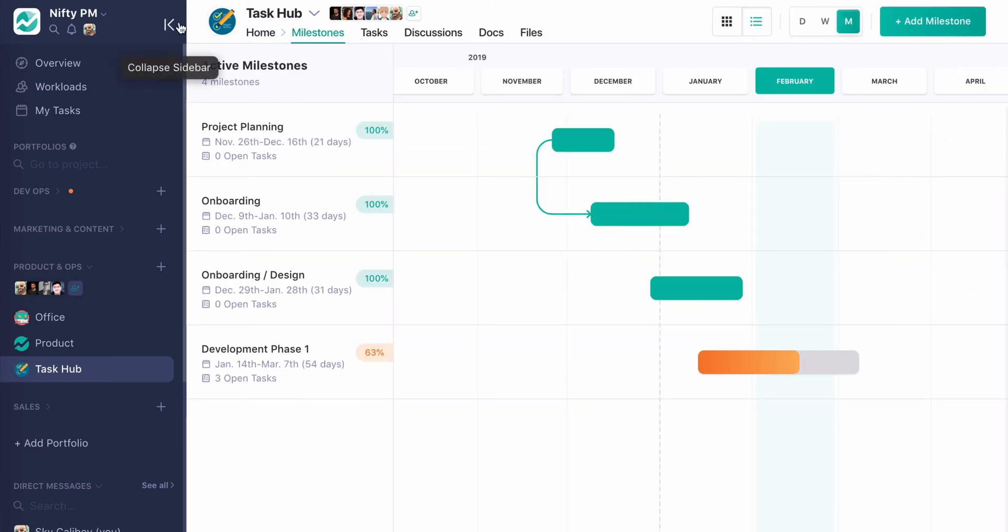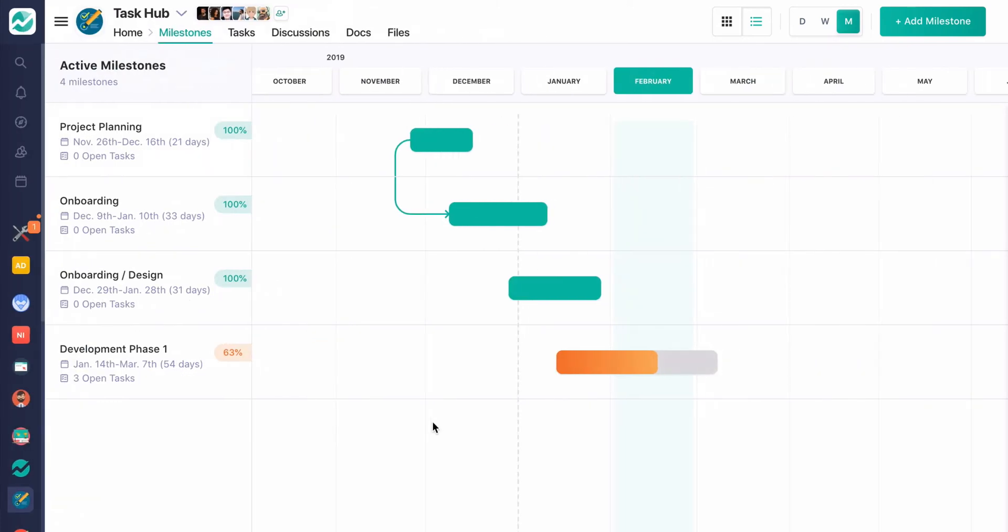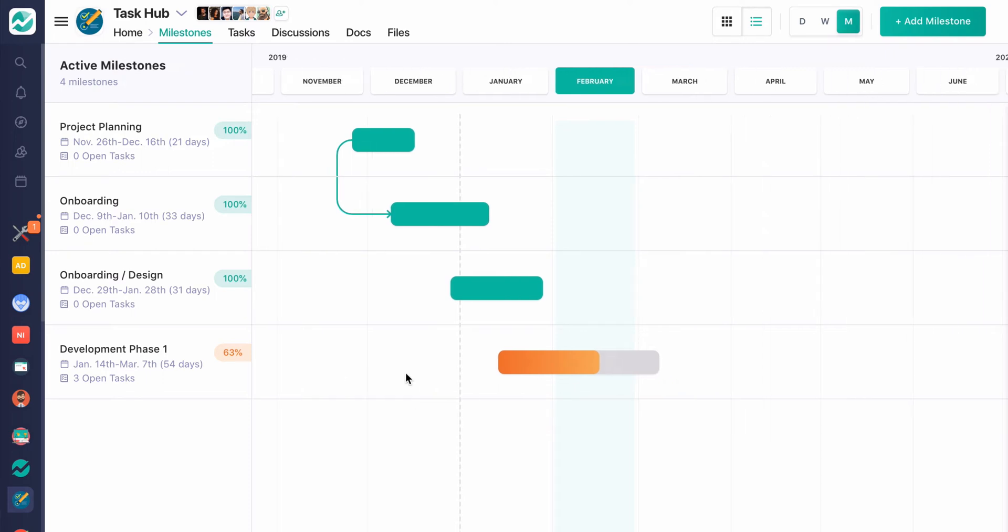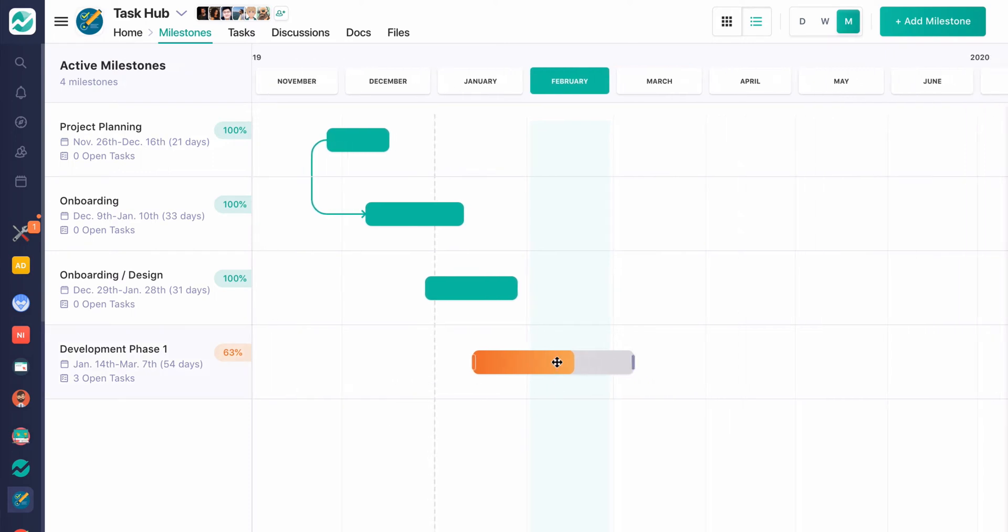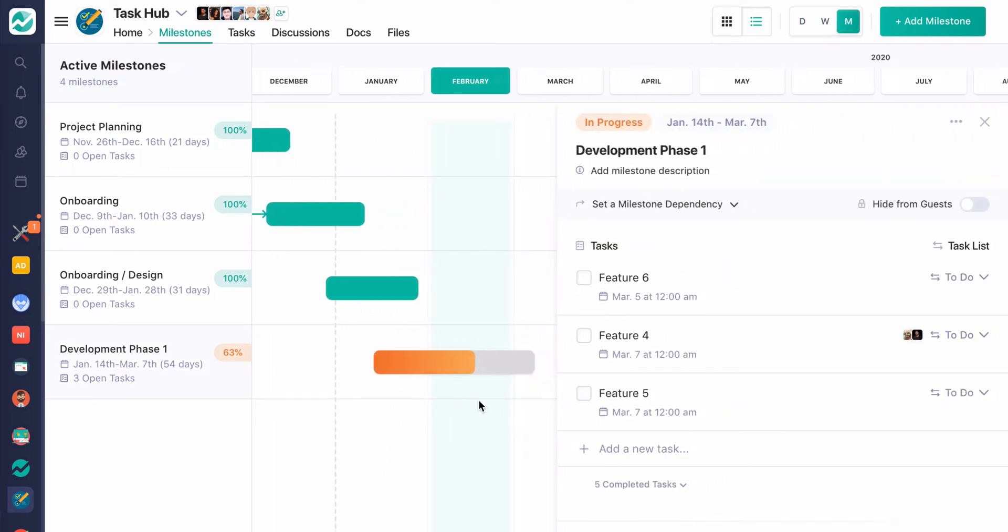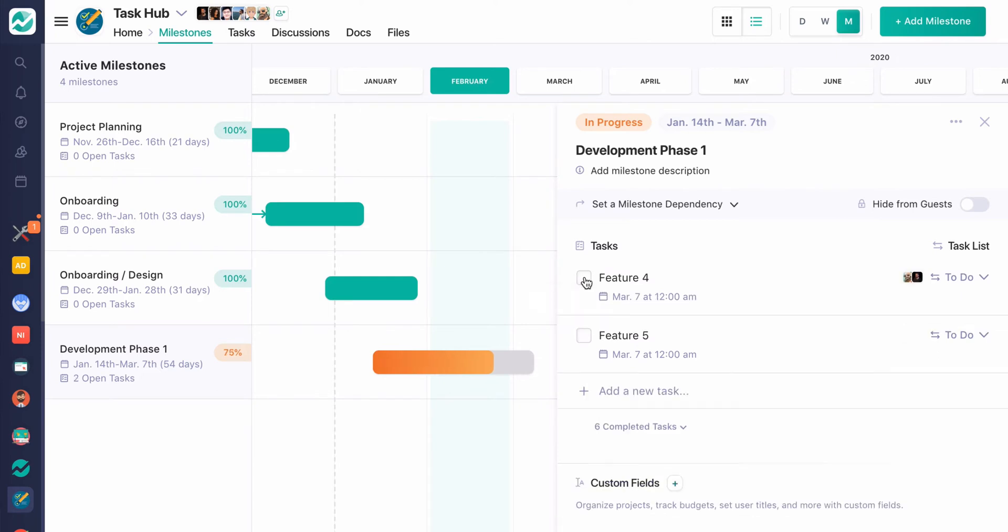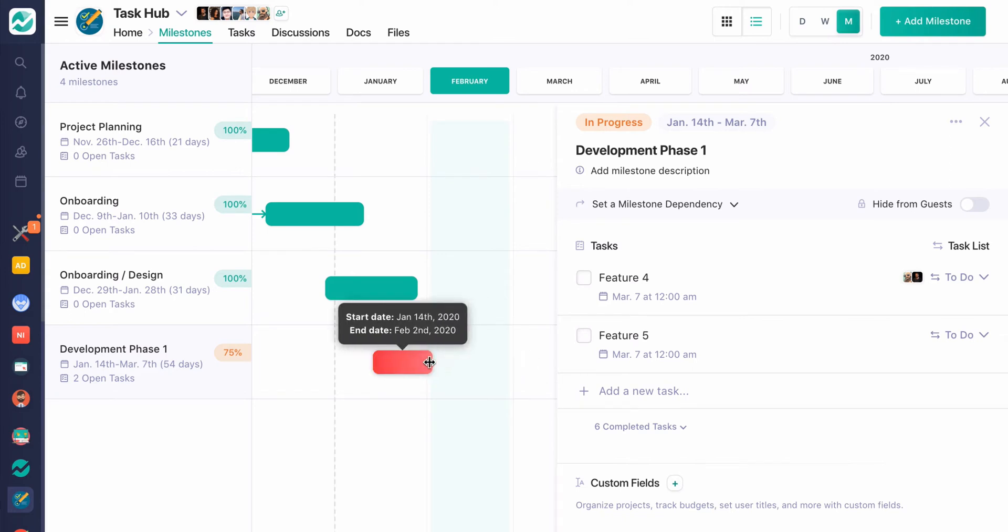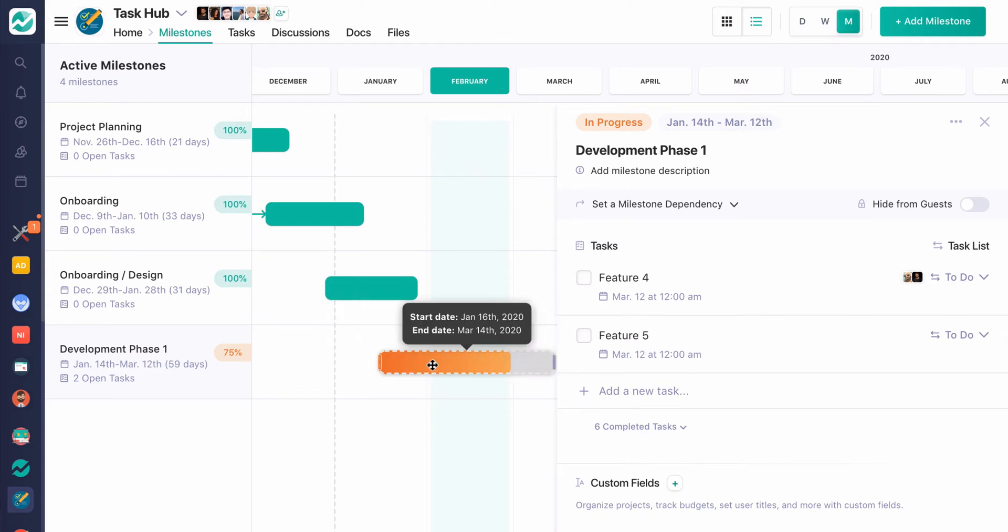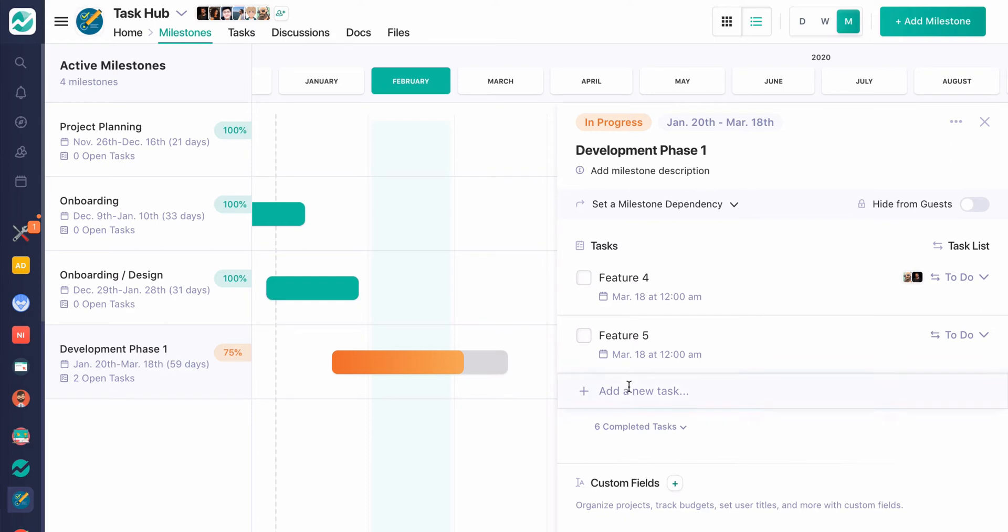I'm actually going to collapse the sidebar here. So we start out on the milestone screen, and what milestones are, are the different kind of goals of our project, or really phases, another way to think about it. And within each of these milestones are the tasks that we need to accomplish to get there. So we can see when we complete tasks, we get a little closer to our goal of completing this milestone. If the date is overdue, we see this turns red, and we can really easily move these around. And so there's a lot of flexibility and value in these, because you're able to see where you stand and quickly adjust that.